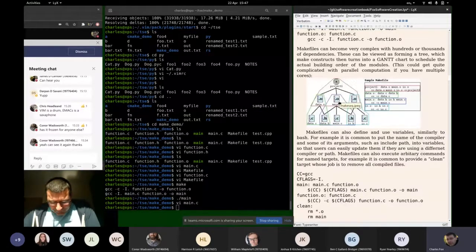Yeah, so we're normally quite down on Gantt charts for the design of projects, but for the build of them, they're very useful, because in a build you really do need to know that this thing depends on these 3 other things, and you have to go and do those first before you can do this. And that's why a Gantt chart is used, not by the engineers who design the bridge, but by the construction company who does the build after the engineering's been done. And it's why it shows up in the make file to do the build after the software engineering has arguably been done.